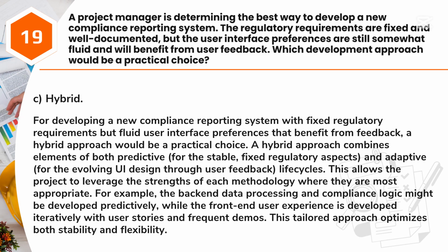For example, the back-end data processing and compliance logic might be developed predictively, while the front-end user experience is developed iteratively with user stories and frequent demos. This tailored approach optimizes both stability and flexibility.